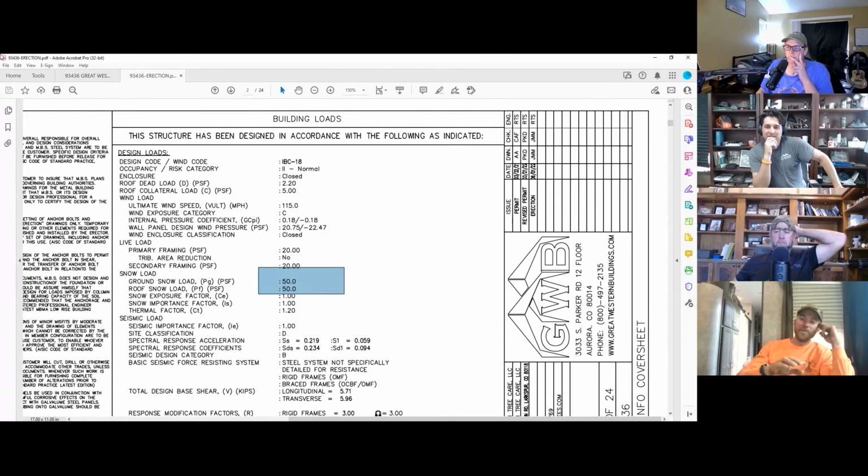I always estimate that price per square foot for concrete with dirt work, concrete, rebar, and everything else is $20 a square foot. That's just ballpark. And typically that comes out pretty close to a little bit under what the price of the building comes to. And that's what scares customers away. That gives you a full foundation, completely done, finished, and move on. And the price of your erection should be about half of what you pay for the building.